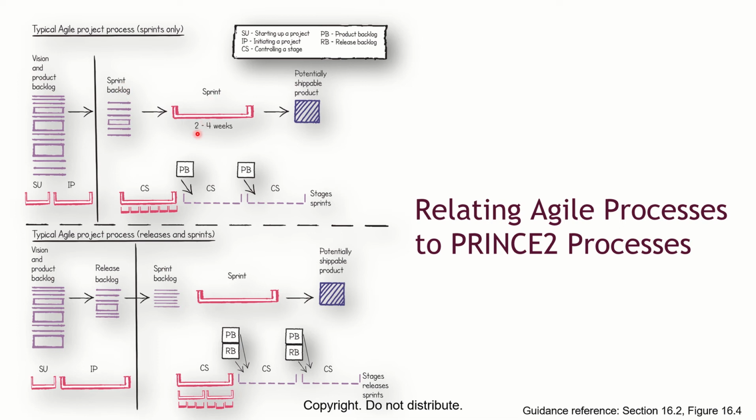Sprints are supposed to be achieved within 2 to 4 weeks. That is the ideal state or situation. The plan is always to break down to what you can achieve in 2 to 4 weeks as much as possible. In some special case, you can say, okay, you are doing it for a quarter, 3 months, but it's better to still break down the 3 months into what you can achieve in 2 to 4 weeks.